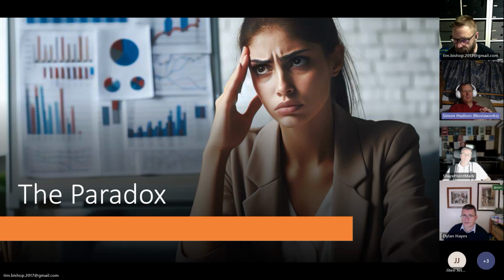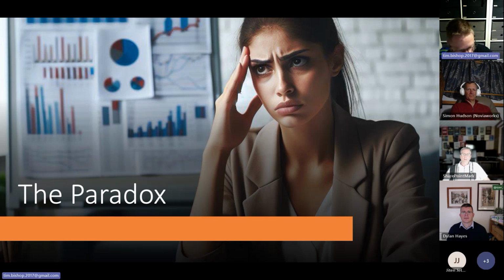Yep. I think the development team can make suggestions in terms of, well, what about if we don't do this scope, but we do this other thing in a slightly different way? And they can trim functionality or modify functionality to make it easier to achieve. Yeah, exactly. And what else can we do to make ourselves go much faster? Can we not just review what the requirements are and see whether or not there are new ways of doing the things that originally came to light? Correct. Yeah. Do things faster or do things lighter, or maybe drive even harder at an MVP than you have been before. What else can we do?